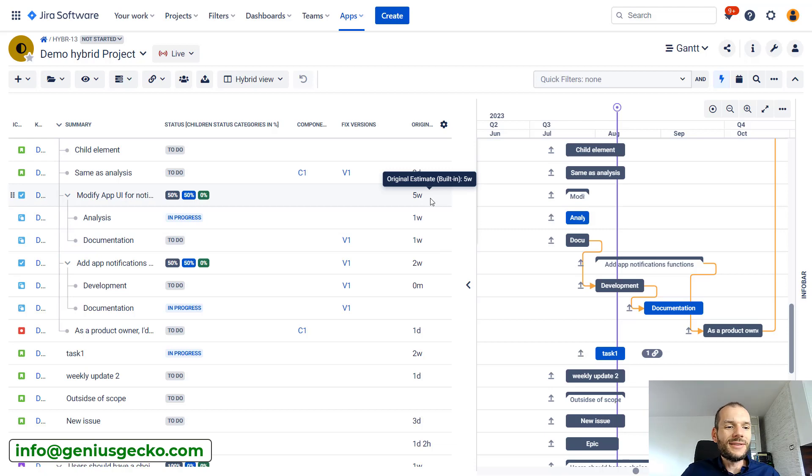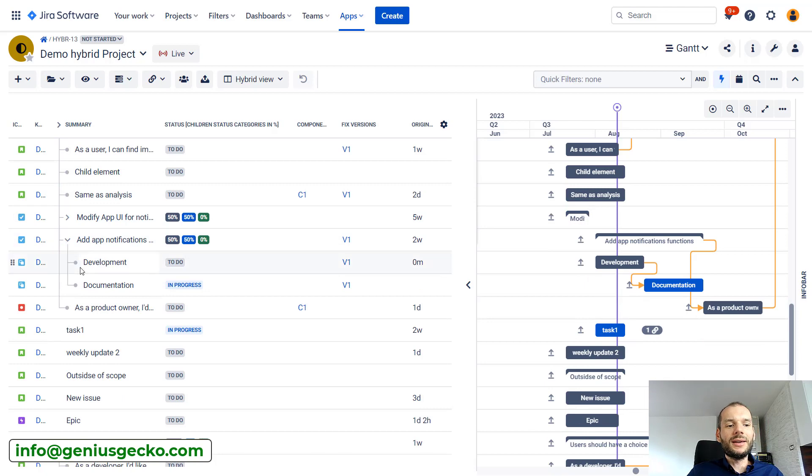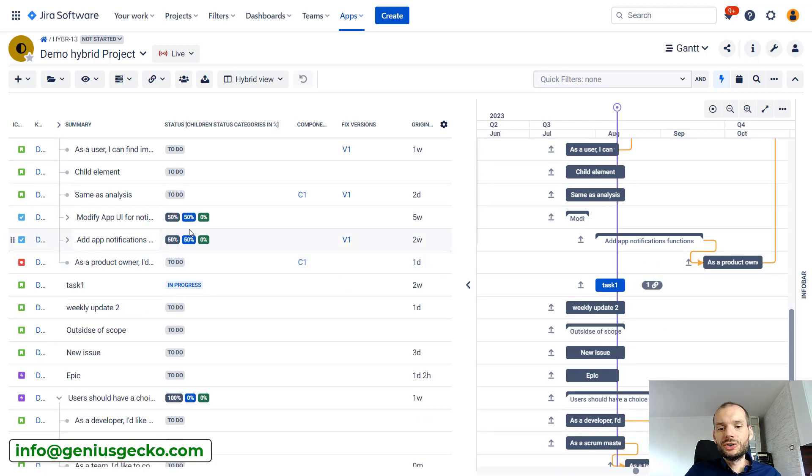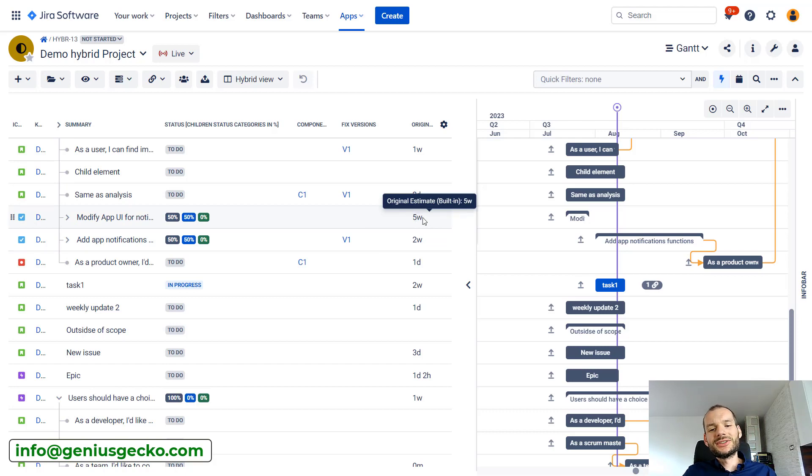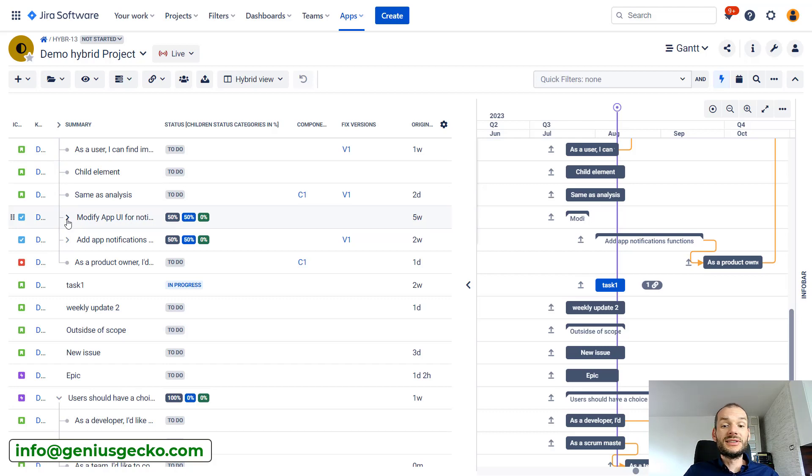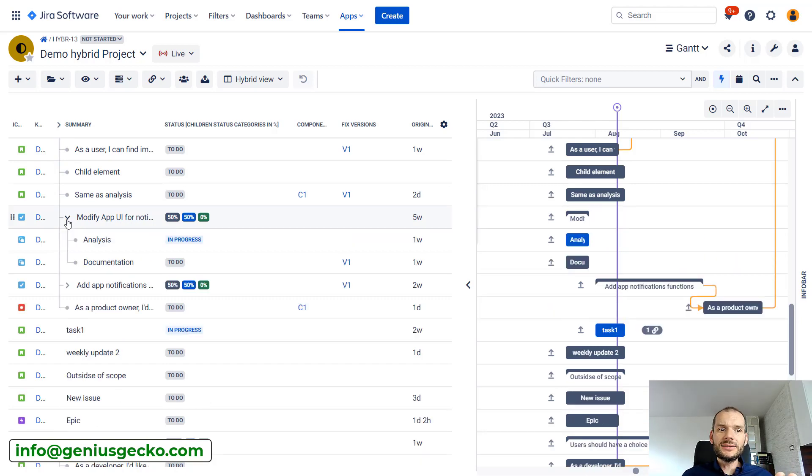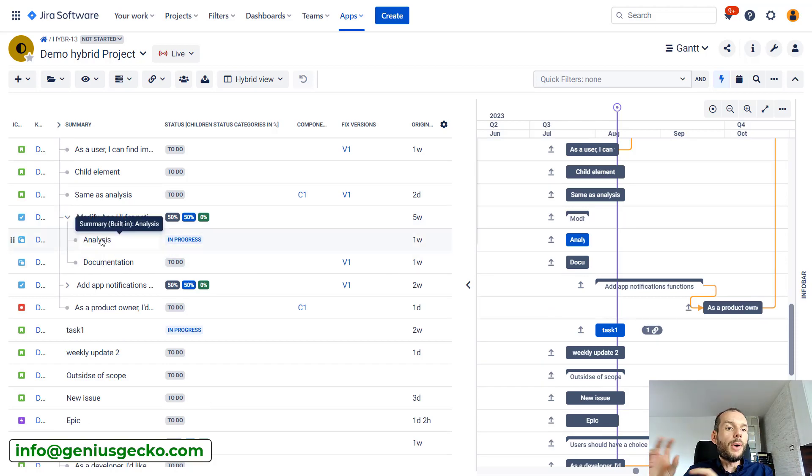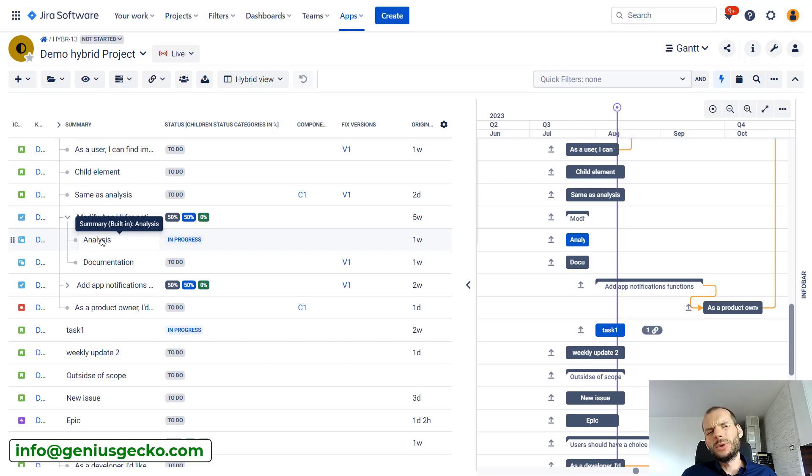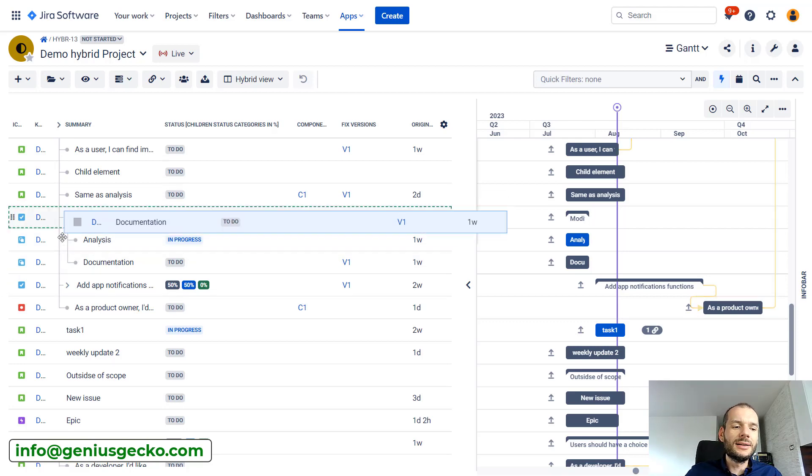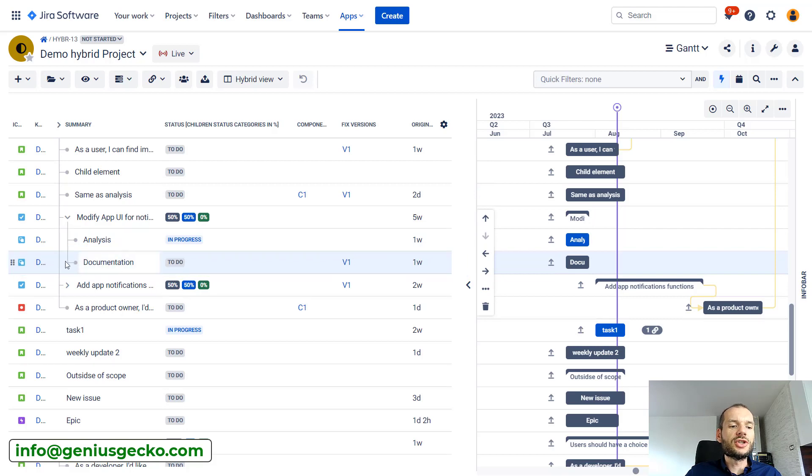This is valuable because we may want to collapse the tree to not see the children we don't want to see at that level of detail, and then we just see the overall estimate. We do not need to drill down to see what is there. But this is based on the hierarchy that we have here, so it might be box specific. It will basically stay the same unless you move the task and change its parent.